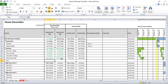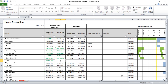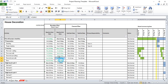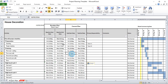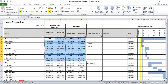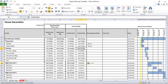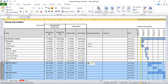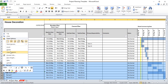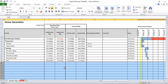The door will happen two days after the second coat goes on the wall and will last two days. So that's my baseline plan. Now I'm going to copy all of that and paste special as values into that area, so all of those dates are now in my plan. My baseline is the same as my current plan. I don't think I need these tasks down here, so let me just delete them — I can right-click and go delete, or clear contents.